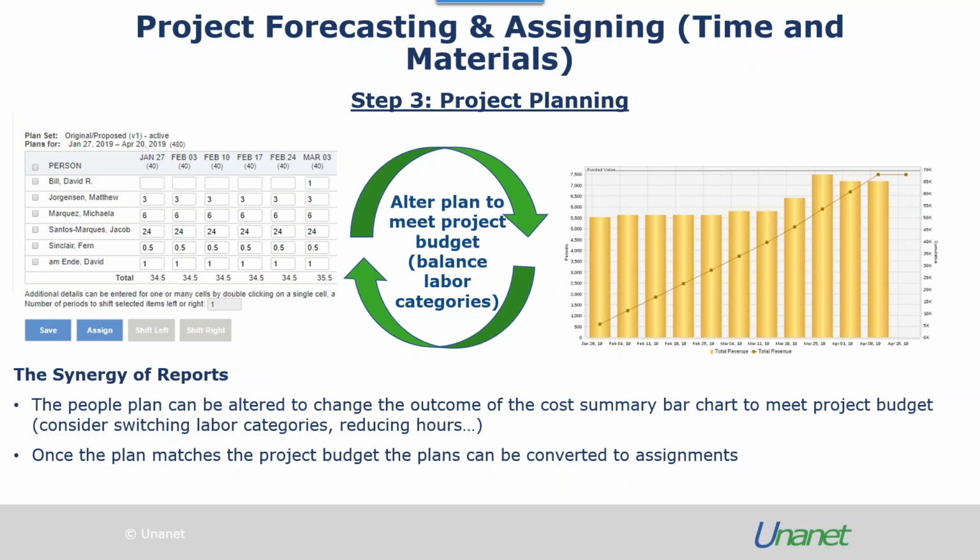And once you're happy with the plan, it can be converted to assignments by clicking the Assign button below the grid. And this now allows the resources to charge to the project. And I want to point out at this point here, you can actually add in a control that could be included so people cannot exceed your allocated assignments.